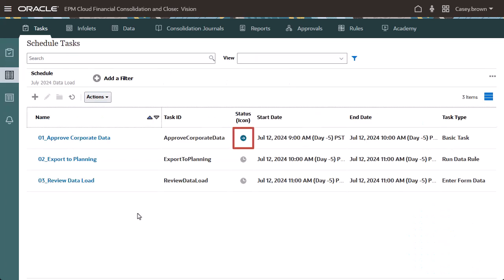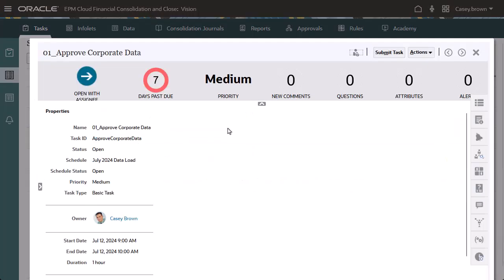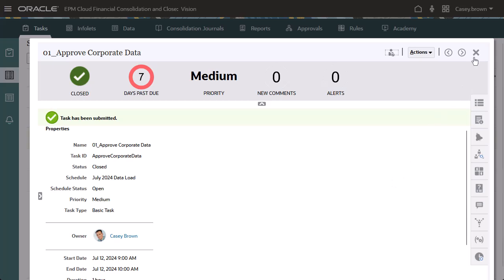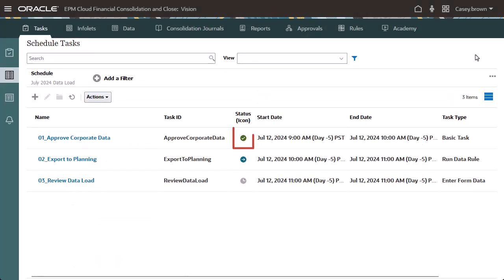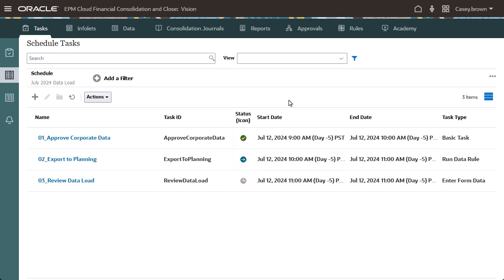The Approve Corporate Data task is opened, and the other tasks are pending. I'll submit the Approve Corporate Data task. The status for Approve Corporate Data is now closed, so the successor task, Export to Planning, automatically runs the data load. The task status automatically changes to closed when the data load is complete, which allows the successor task to open.